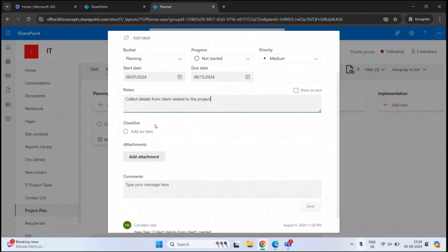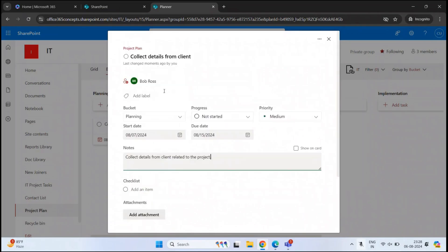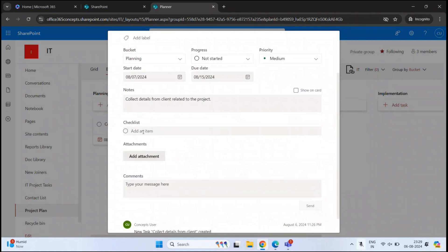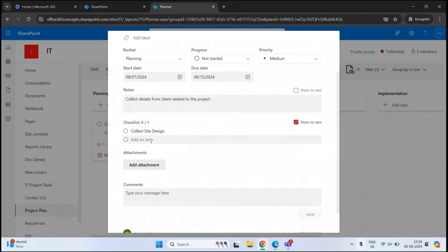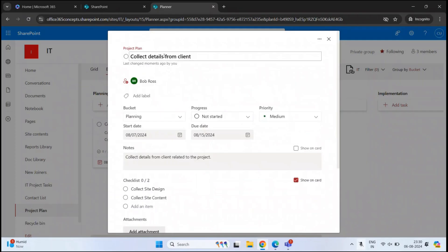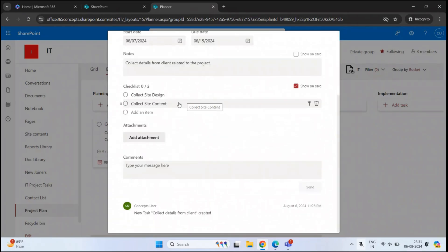Then we have Checklist. The task Collect Details from Client has subtasks as well, like Collect Design of Site and Collect Content for the Site. We can create these subtasks under the checklist. Where it says Add an Item, type the subtask name — for example, Collect Site Design — and hit Enter. Let's add one more: Collect Site Content. So now we have two subtasks under this particular task.